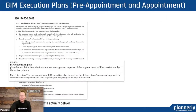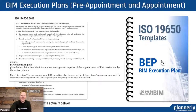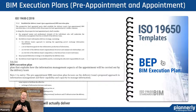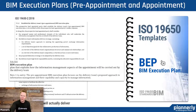And then when we talk about BIM execution plans — this is one of the most talked about documents. We do have a template for that. But the principle is that this is broken into two parts: one as an answer to the appointing party's requirements, and then as you start to work on the project, you will build and continue to improve one. This is really how the project team will be delivering — what are the processes, what are the steps that teams are going to go through. This is where rubber meets the road.